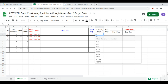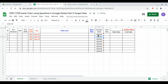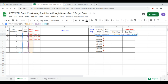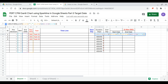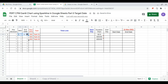We continue with the duration formula: the number of man-hours divided by eight, times the number of shifts, times the number of men. We write a condition that if the number of man-hours is empty then it's empty, otherwise calculate.